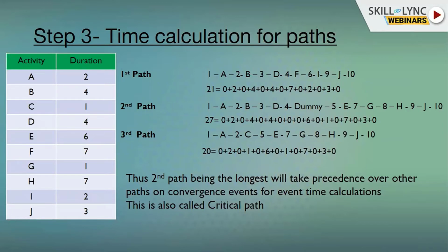This is the most important path, or this gives you the duration of the project. This gives you critical activities that need to be monitored without fail. Any delay in these activities will definitely directly hamper your project duration.